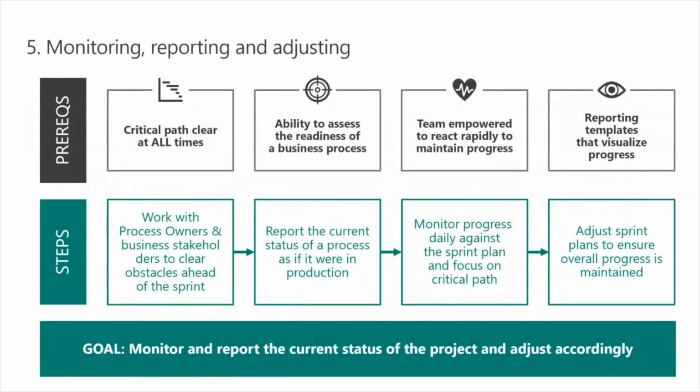Okay, for monitoring and adjusting, which is a critical part of this approach, make sure that on a daily basis you are monitoring the progress of the project, and on a daily basis you are adjusting to the signals you're receiving. The daily triage that's happening has some meaningful action that comes out for the PMO and for the team leads to say, here are the obstacles ahead. This is what I need to fix before tomorrow. I need to get this done before tomorrow. It's at that daily cadence that you're adjusting and monitoring.